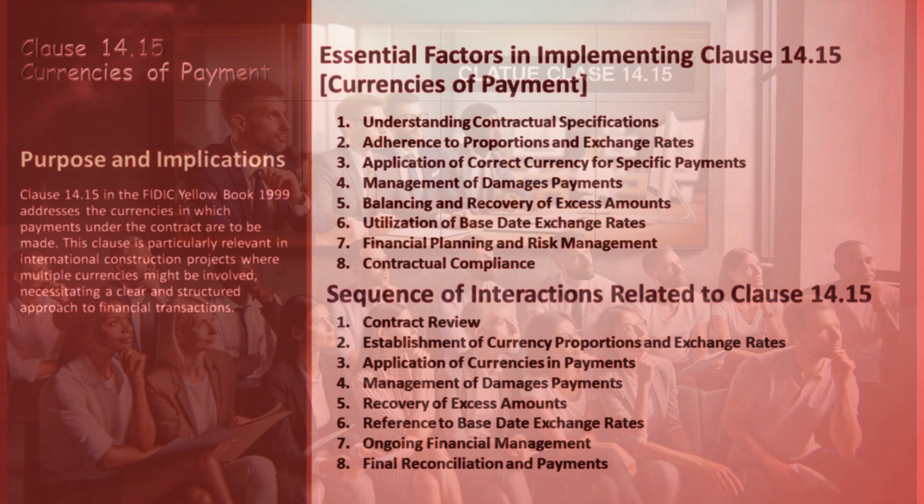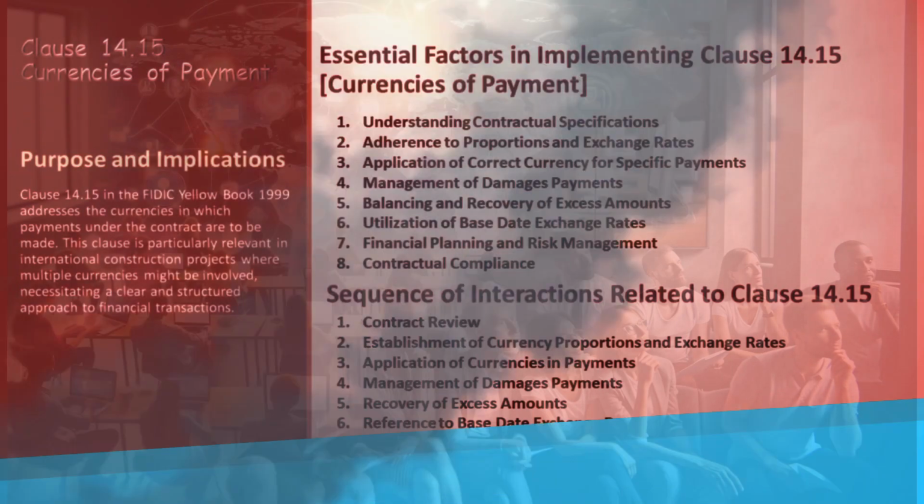In the absence of specific exchange rates, refer to the rates prevailing on the base date, as determined by the country's central bank. Throughout the project, manage all financial transactions in accordance with the currency stipulations of Clause 14.15, adjusting as necessary for currency fluctuations. At the project's conclusion, ensure that all final payments and reconciliations strictly adhere to the contract's currency requirements.